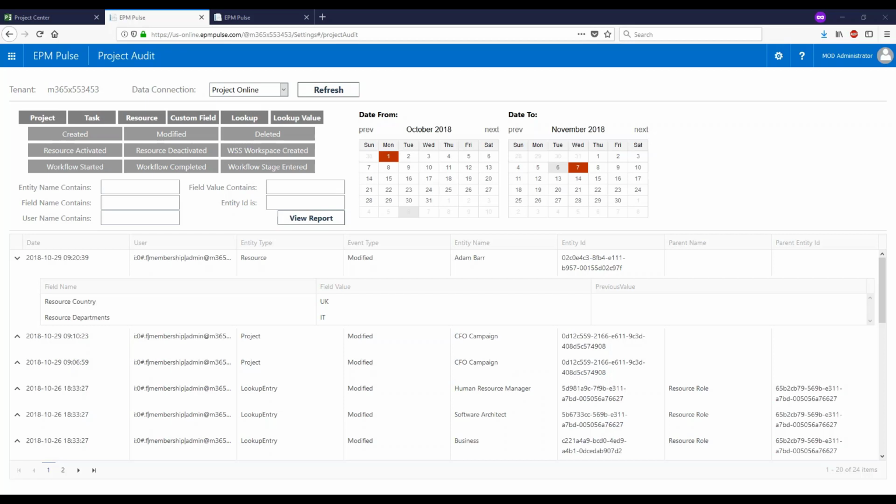So like two project managers can be working together on a single project, and they can update a single project one after another without checking whether there is a newer version, and then the later version overwrites the previous one, and all the task changes that were made by the previous manager would be missing.